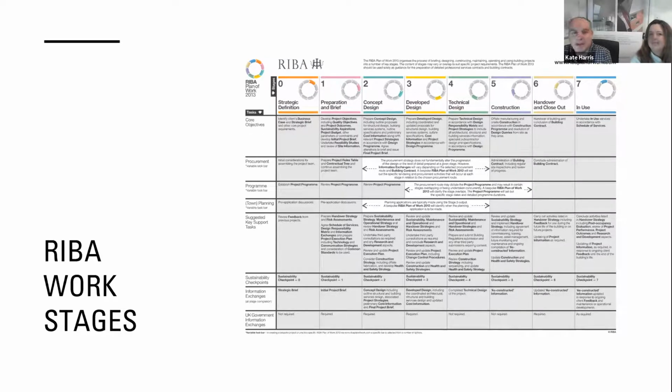So it might well be that you feel comfortable undertaking the project management, which will involve dealing with the contractor on a weekly basis to go through the progress that they've made and to sign off their work basically and enable them to be paid. So if you don't feel that you have enough confidence to undertake that role, that's a role that we can also undertake as project manager.